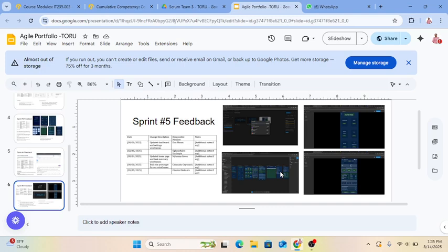And something I think we could have done to solve this problem is that we could include agreed upon response times, daily progress updates, and also clear channels for urgent issues. This would ensure that all members remain engaged and informed throughout the sprint.